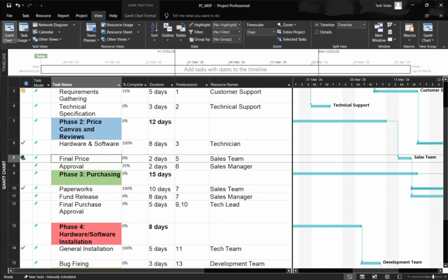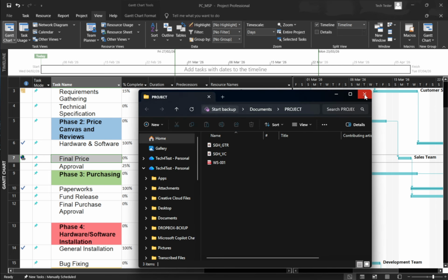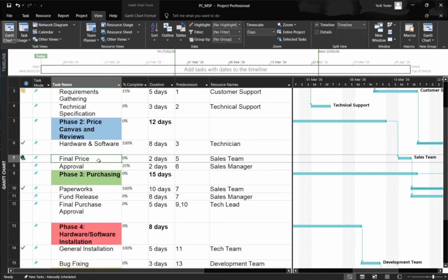Back in your schedule, look for a small hyperlink icon in the Indicators column next to the task. Clicking that icon opens the link instantly. You can link to a web page, a local or network file, or even a location within the same project if you browse to it in the dialog. A quick tip: if others need to access the file, store it on a shared drive or cloud location they can reach. For web addresses, include the full HTTPS:// so the link resolves correctly.